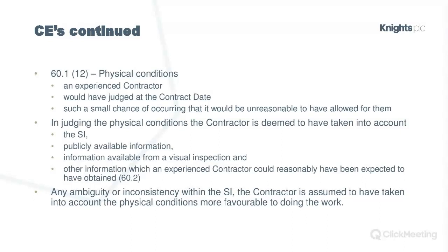But you've got another hurdle to get through. You've also got to show that in judging those physical conditions, so when you think about your physical conditions at the start date, it's obviously an experienced contractor. So this is about your judgment.